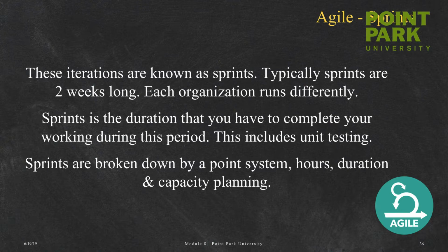You tell them right off the bat, you know what? I'm working on another project, so I can only devote 50% of my time. What that means is you can only do 20 hours per week. So anything that they assign to you, you can't go over 20 hours. But you've got to be careful here, because it'll be up to you to decide, hey, this task right here, I think it'll take me 4 hours. But in reality, you're thinking, if I hit this bug or run into that situation I did a couple months ago, it might take me 8 hours, but I'll just tell them 4 hours anyways.